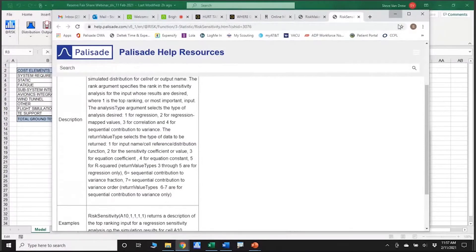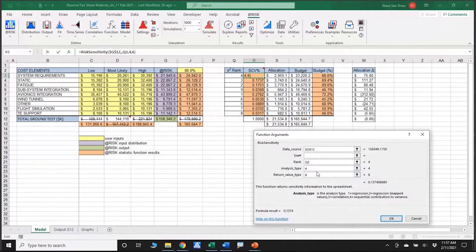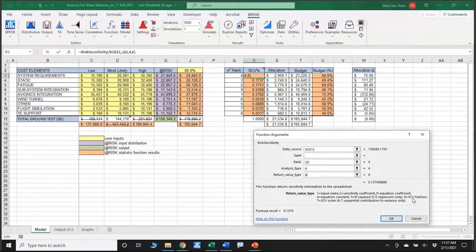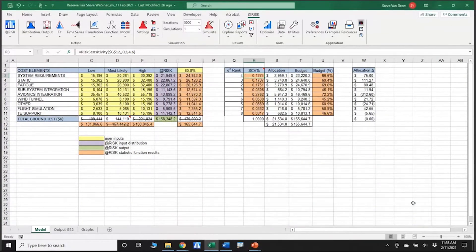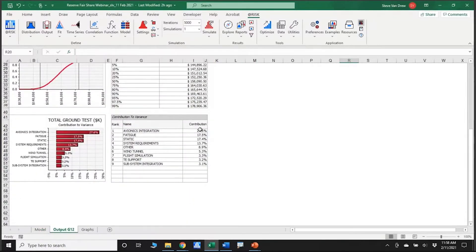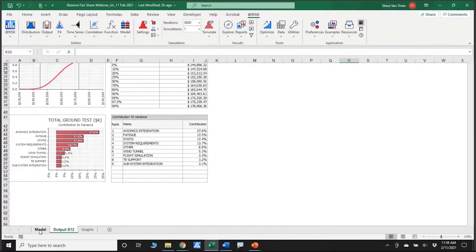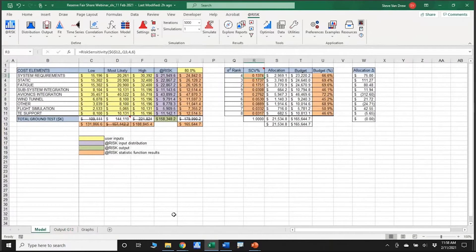I wanted to use contribution to variance — analysis type 4 — to do a similar approach as before. I also asked for return value type 6. The help description says SCV fraction is what type 6 is — SCV stands for sequential contribution to variance, which is the tornado diagram approach used in my run. The one that threw me for a loop was the rank parameter. I wasn't sure what it wanted until I looked at the output and noticed the ranks were one through nine.